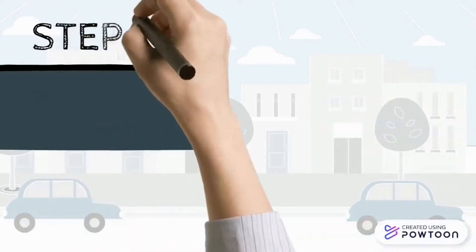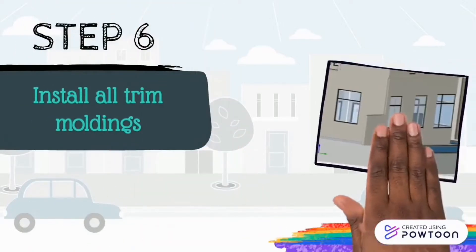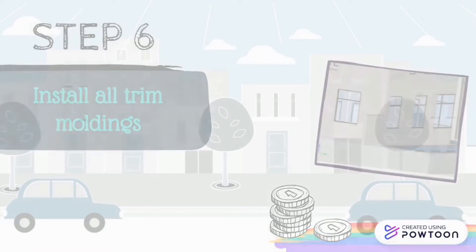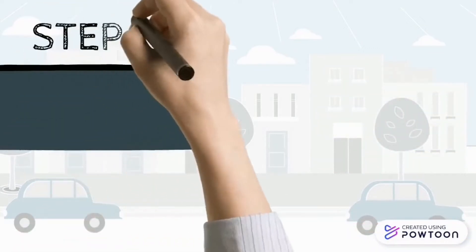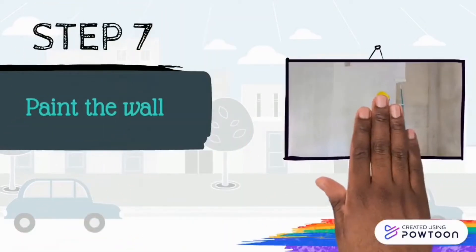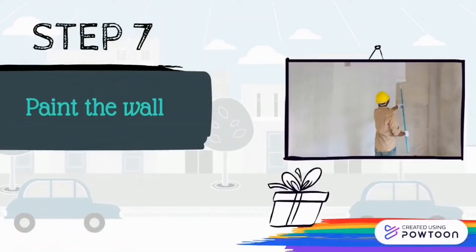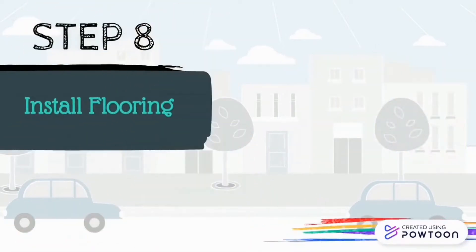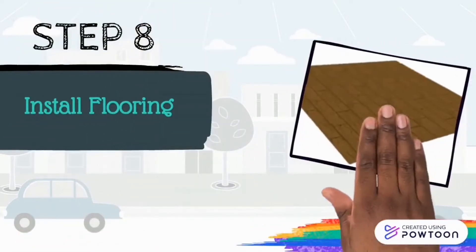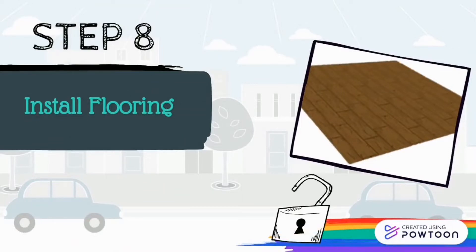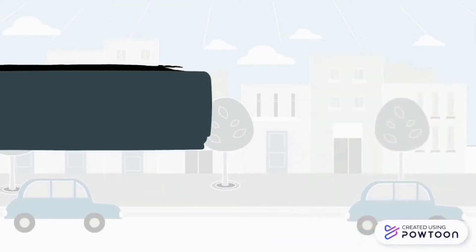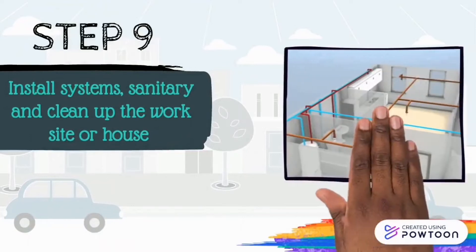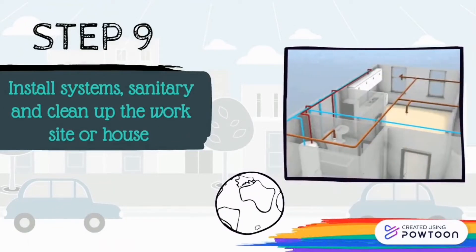Step 6: Install all trim buildings. Step 7: Paint the wall. Step 8: Install flooring. Step 9: Install system sanitary and clean at the worksite or house.